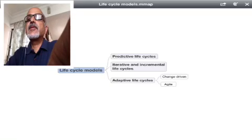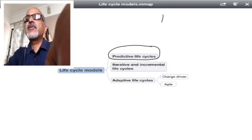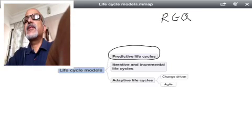The first one is the Predictive Styles. In the Predictive Styles, an example of this would be like first you have a requirements phase where you freeze the requirements completely, get the sign off. Then you get into the high level design, then you get a sign off for the high level design.